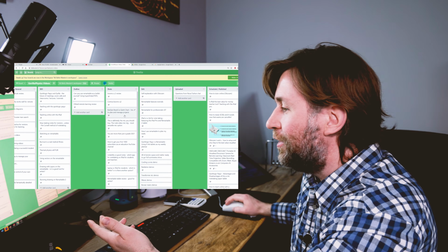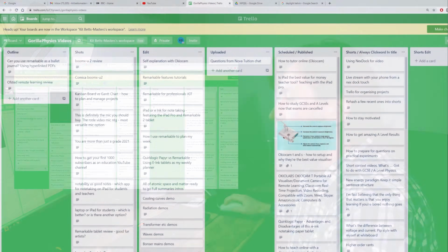But you wouldn't use a Kanban board for a project which is based around one central idea. It really streamlines the process of producing videos for me. Any video idea can be left at a certain point in the video production process. So at any time I come back to it, I can just take one video and move it along 1 or 2 steps. So quite literally, my video ideas come in here on the left and they work through each of these processes.